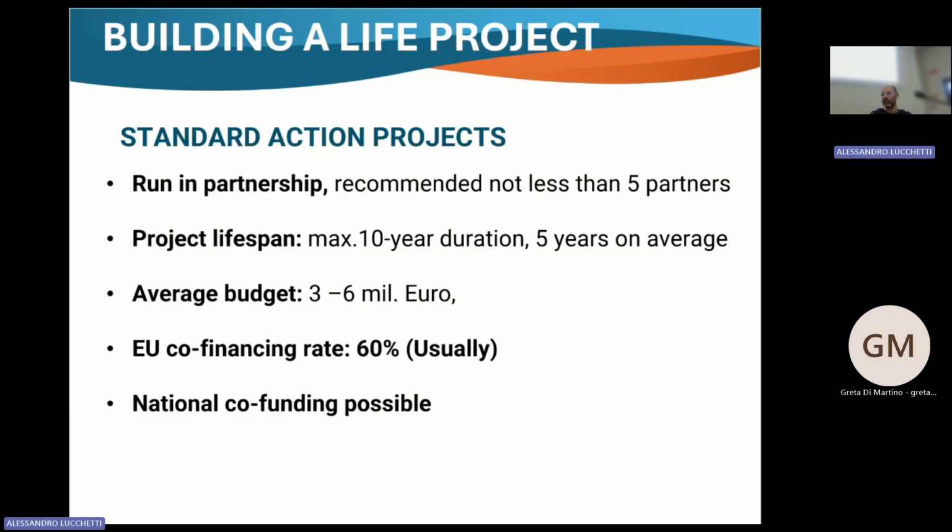I just won a project of 6 years, but to be honest, I'm not so happy, because usually after 3 years, the partners will lose attention to the project. Therefore, try to keep the project between minimum 3 and maximum 5 years. But 5 years is really hard, because you have to take people one by one when you have a meeting, and it's difficult.